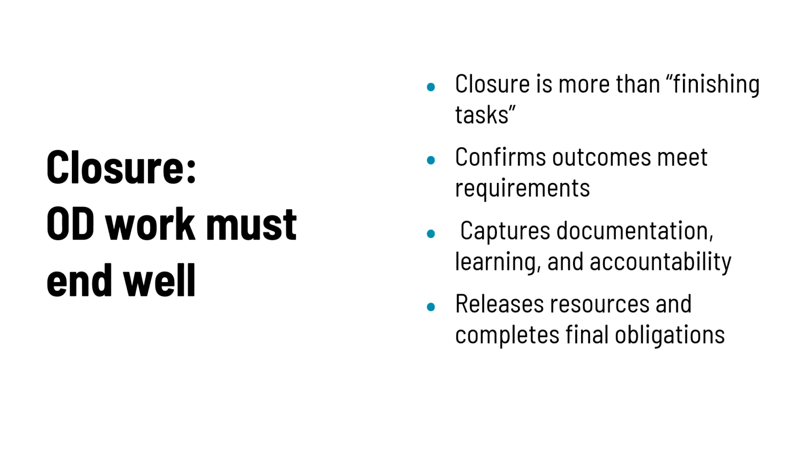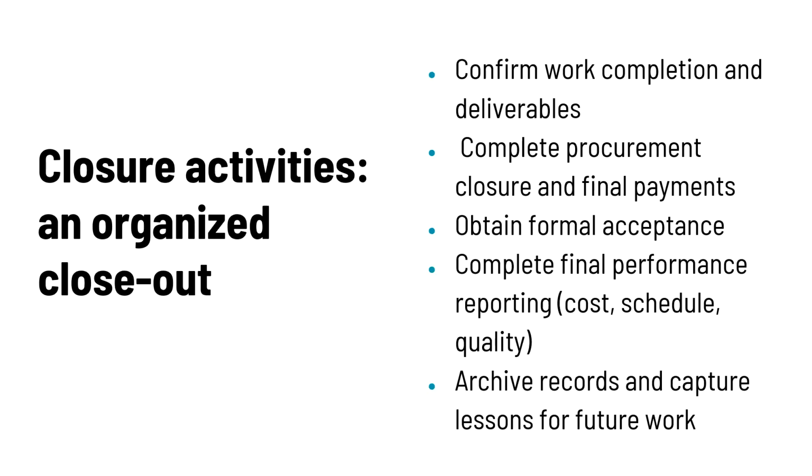Finally, OD work needs closure. Closure is not just, yay, we finished the work, but it is the stage where you confirm that deliverables meet requirements, formalize acceptance, and ensure documentation and learning are captured. Closure also includes practical responsibilities like archiving documents, final payments, releasing resources, and ensuring the organization can move forward with clarity and accountability. Now, closure includes a set of disciplined closeout activities.